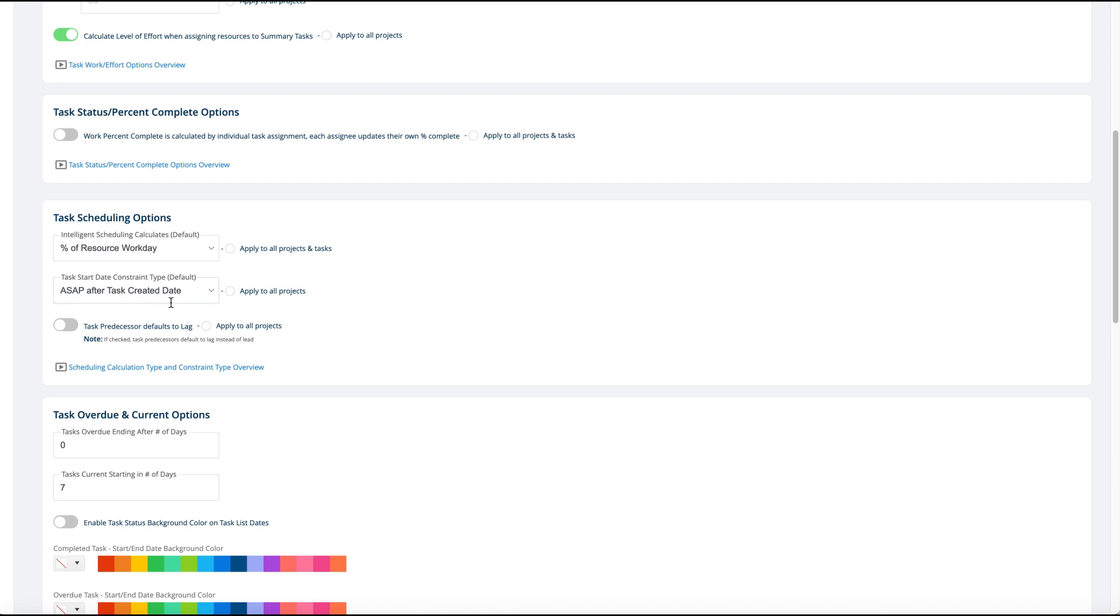But our default is that it's both after the project start date and today being created. So normally that way it prevents you from putting a task in - if your project was three months ago and you add a task, it doesn't automatically calculate the task to start three months ago. That makes no sense.